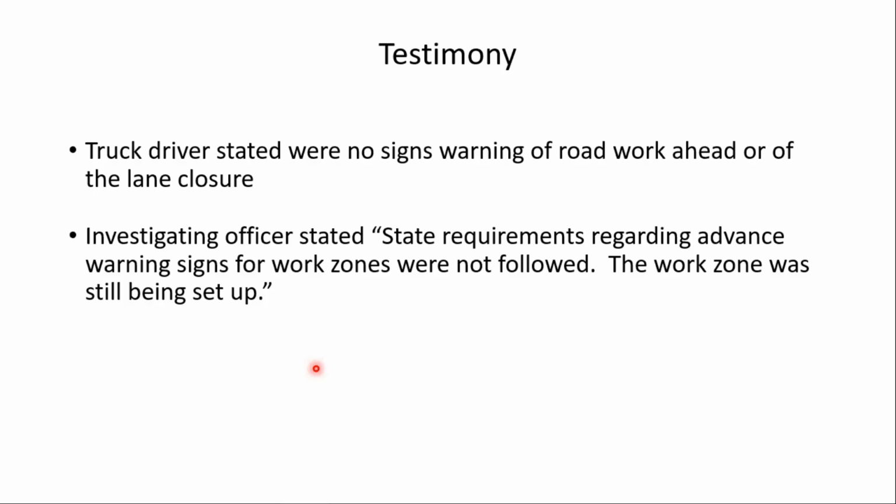The work zone was still being set up. So they were still setting up the work zone. It was not completely set up at the time, but it sounds like they set up the taper and the work area first rather than setting up the warning devices first.